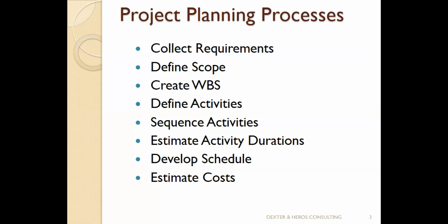Why do I need to sequence also before estimating cost? Because money for a project is not all made available at once. If a project is going to cost us 2 billion, nobody will give you 2 billion. It's a risk. So usually when you sequence it, you know what we are going to be doing for the next 1 week, 2 days, 2 months, 1 month, and probably money will just be released for those ones first, with the hope that before we get those done, the money for the other ones will be made available. So the need for sequencing activities before cost.